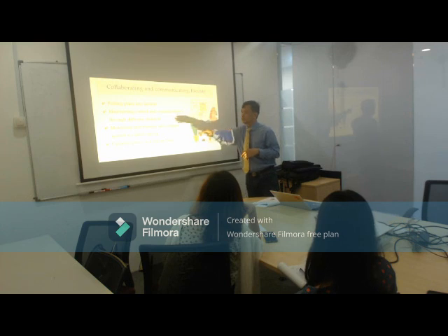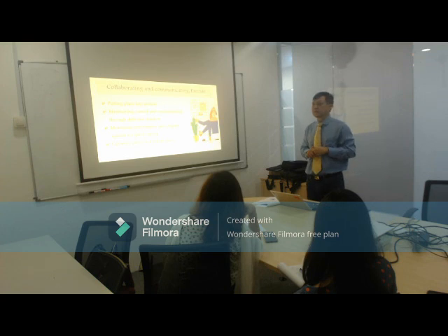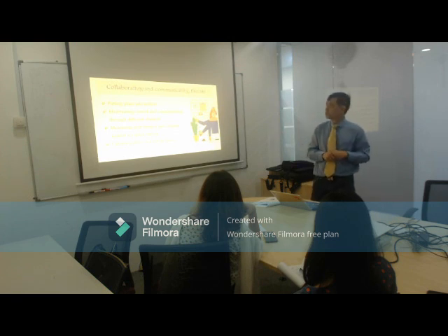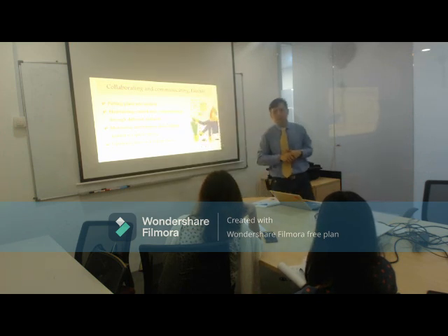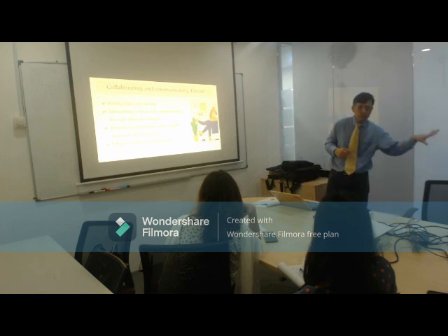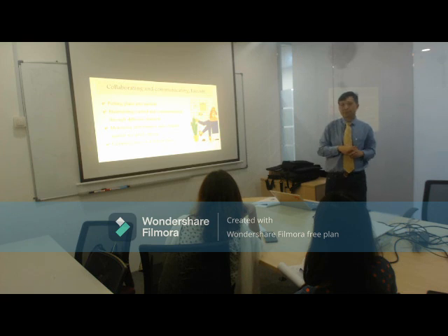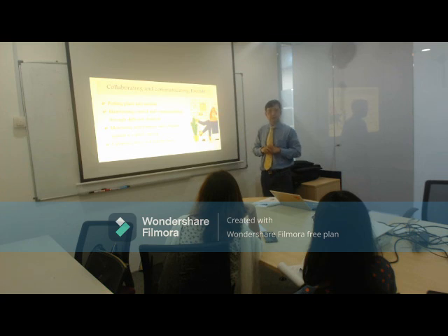Then she also has to make sure she can communicate regularly with the painters. If any one day the painter suddenly decides that he's not well, she should know it instantly and update her plan accordingly. Yeah, so this is part of maintaining control and communicating. So one way of doing it is that she may want to take daily calls to the painter. Painter, are you done? But before she reaches the painter, she may need to speak to the person who's clearing out the furniture, taping all the things on. And that was our friend Jack who's going to help with all those things.